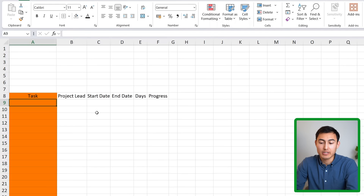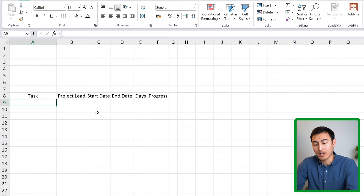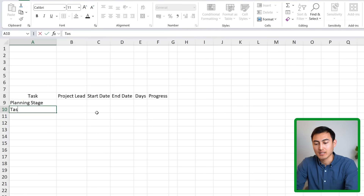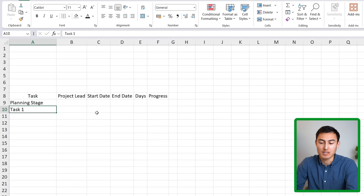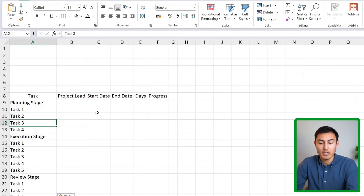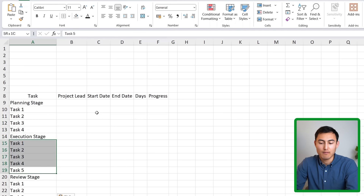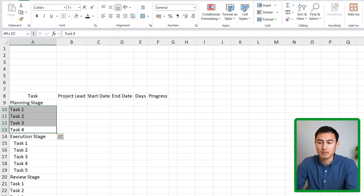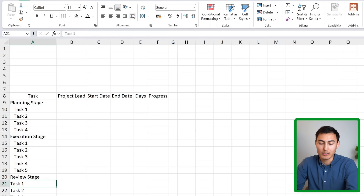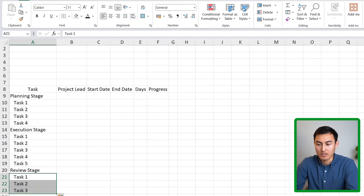Under the task column we can add the different tasks, split into three stages: a planning stage, an execution stage, and a review stage. We can indent the individual tasks using the indent button so they look grouped under each stage. Feel free to add more tasks if that suits your template better.